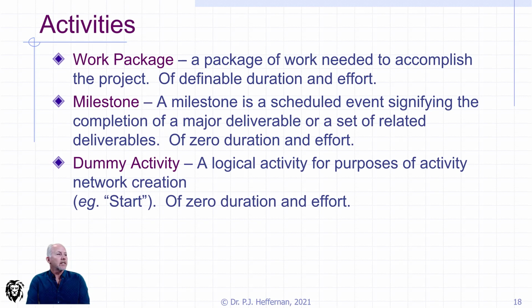So, other activities. We've been talking about the work package, but there are a couple of other activities that you might see. They're logical activities. First off, a milestone. It's a zero time, zero resource activity, which is basically a phase gate. It represents that you've come to the end of a subtask or something like that, and so it's a logical gate that you're trying to work towards in your other tasks.